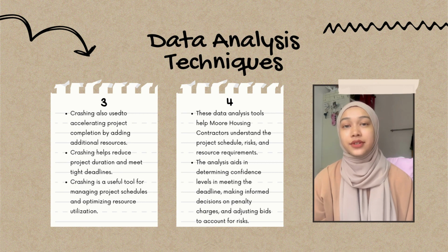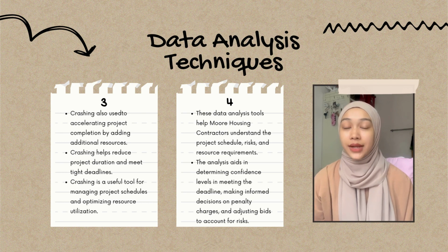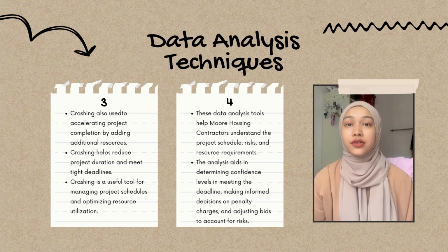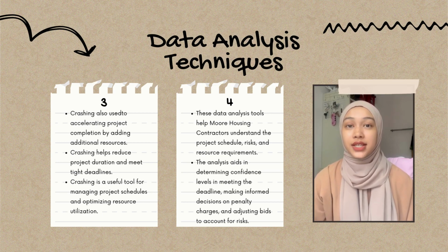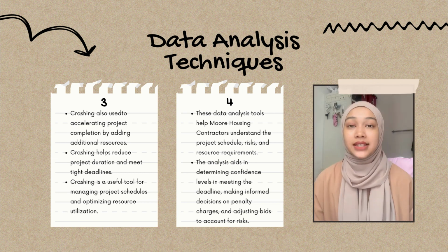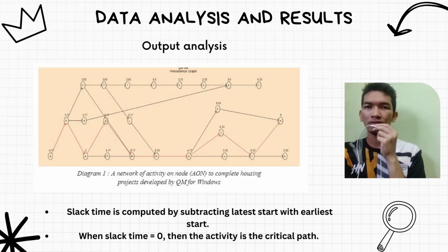This technique helps in reducing the overall project duration by analyzing the trade-off between cost and time. By utilizing crashing, More Housing Contractor can determine the critical tasks that can be expedited and allocate resources accordingly to meet the desired deadline. These data analysis tools help More Housing Contractor understand the project schedule, risk and resource requirements. The analysis aids in determining the confidence level in meeting the deadline, making informed decisions on penalty charges, and adjusting bids to account for risk.